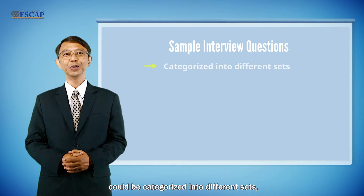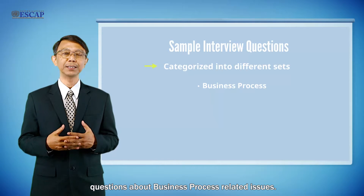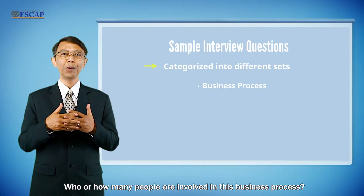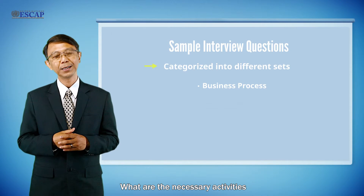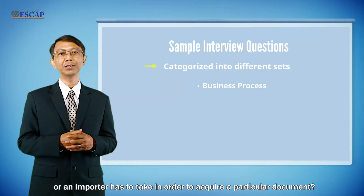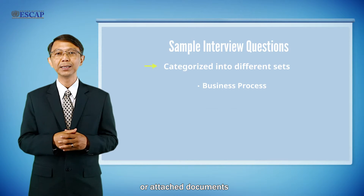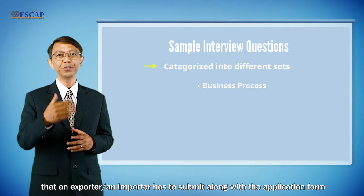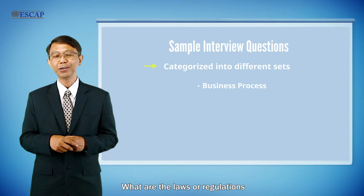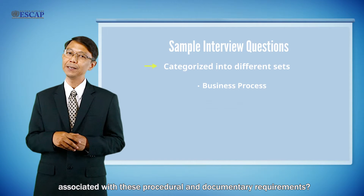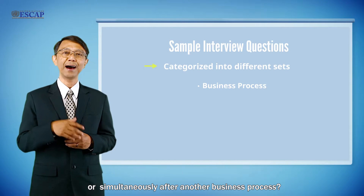The interview questions could be categorized into different types, such as questions about business process related issues. For example: who or how many people are involved in this business process; what are the necessary activities that an exporter or importer has to take in order to acquire a particular document; what are the supplementary or attached documents that have to be submitted along with the application form; what are the laws or regulations associated with these procedural and documentary requirements; or which business processes can be carried out in parallel or simultaneously.